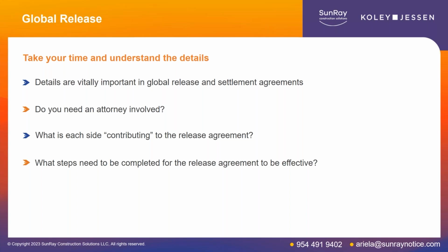And then if there are other obligations, such as you need to make payments to second-tier subcontractors or suppliers, that you give yourself the time to do that and then collect lien releases from them. And so at the point in time where you're signing a comprehensive global release, there will essentially be a roadmap from start to finish of payment and then obligations to release claims.